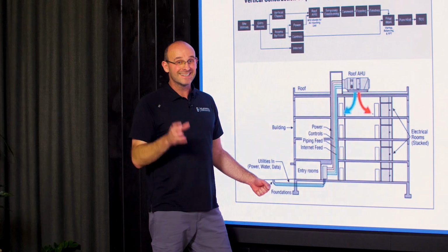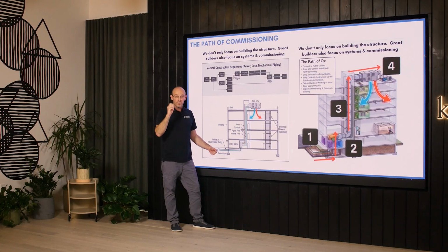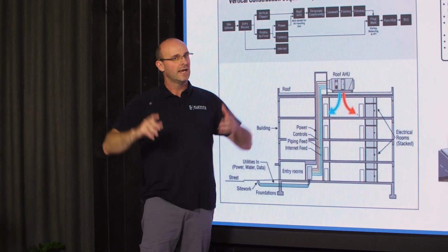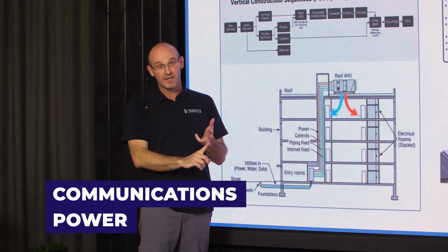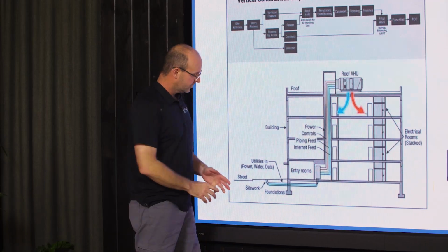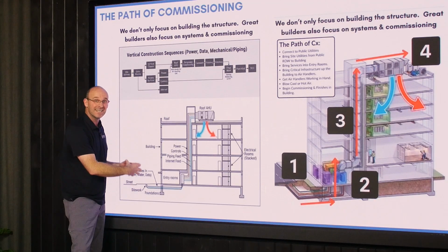That is the biggest thing that we need to start out working on with your owner, the design team, and if you have an owner's rep. Like, we've got to get that going. There are consultants that deal with this all the time, but we cannot be building up the building and not have access to permanent power, not have access to communications, not have the ability to connect to potable water in the road. So this is a massive development and design item.